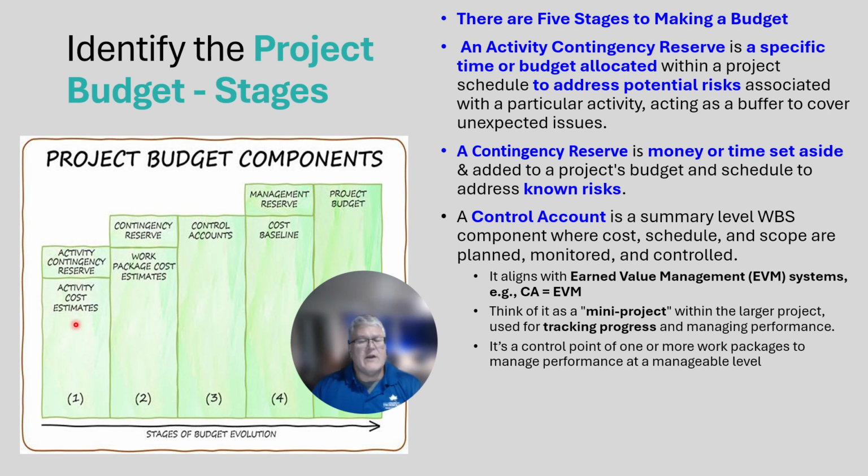So those three areas might go together, putting in plumbing for 2 bathrooms and your kitchen, and that would be considered a work package cost. So you lump sum those all together. And then you might have a contingency reserve even for that, things that you didn't consider, and those would also be known as a set aside for things we hadn't considered. Now it can be as simple as having the separate activity costs or activity contingency reserves, add them together, and that comes up with our contingency reserve.